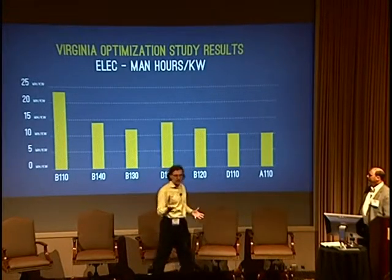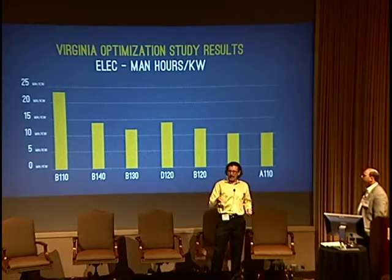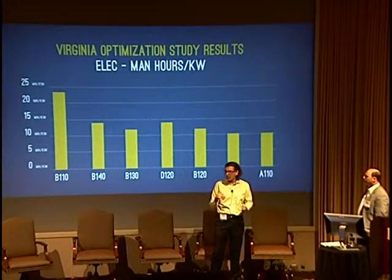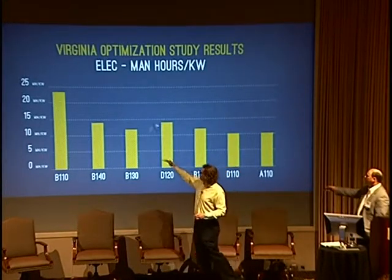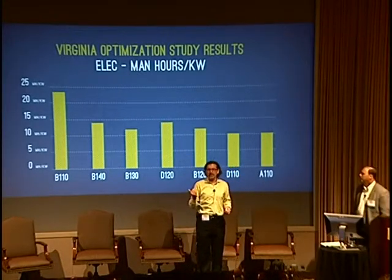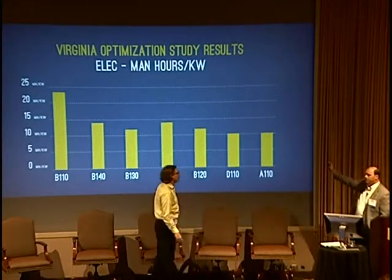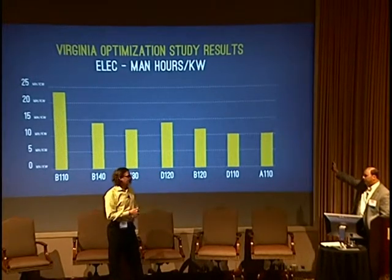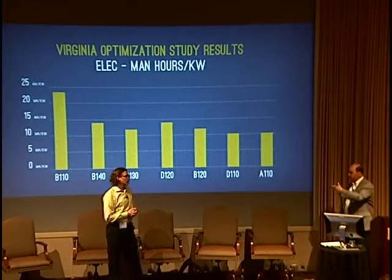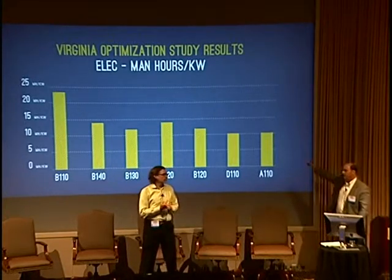This represents 6 or 7 data center projects over, say, a 12 to 14-month period, deployed in pods, very consistent design, and there's a few outliers. Sometimes you have some overtime or other considerations based on schedule, but the basic trend is pretty clear, where you come from say 14 man-hours per kW down to 10, 38% savings, thereabouts, if you did the math. Right. So you go through this on the M&E side. And this is deploying a traditional bricks and mortar stick build with a consistent team, consistent design, and consistent supply chain. So these things can be achieved. Modular can help bring this down even further.